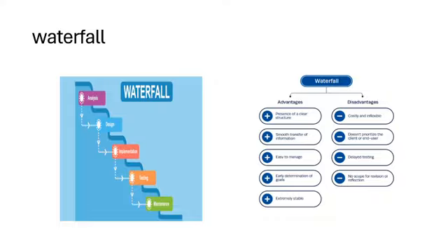And as everyone in the project follows the linear model, there is no risk of deviation from the plan, as it's very stable in nature. However, this model comes with its own limitations. It can be very expensive, as you can only start testing at the last stages where all previous phases have been completed. Any modification and alteration in the project can be very expensive, as they need to start from the beginning before testing and go through all the stages one more time.